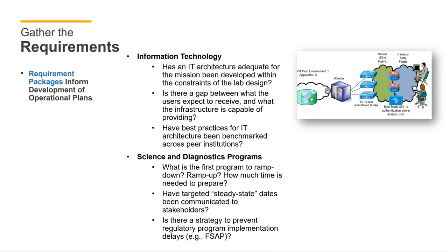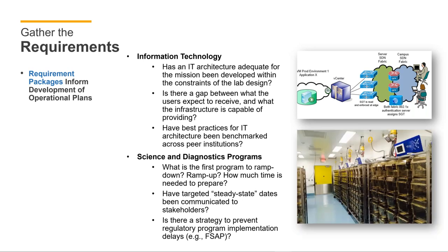And of course, is there a strategy to prevent anything that might be involved in the regulatory compliance pathway? For those of us that are familiar with the Federal Select Agent Program, we know it's not just a given. And if your operations are contingent upon having a select agent registration, that's something to plan for well in advance.